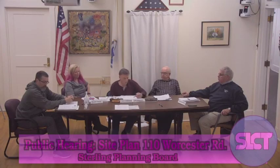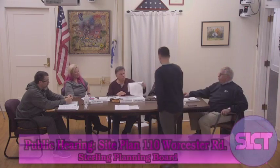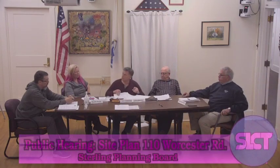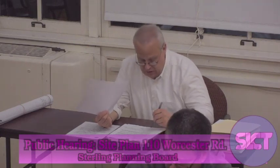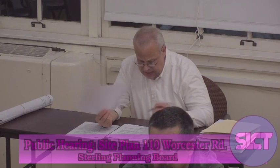Okay, so, all that being said, I've got it drawn out here on the plan for him. You can give that to the applicant. Yep, I'll give this to you, and I'm also going to write down the things that it needs on the back of here, so you'll have all the information, so when you come back, you can be complete, okay? If you just give me a second, unless Steve's already written them down. Add ADA space on plan. Add a parking calculation table per zoning. I can write it. Add a note regarding the groundwater protection district. Add landscaping. And then add the fence that we discussed. So landscaping and fence per the graphic that he marks up.